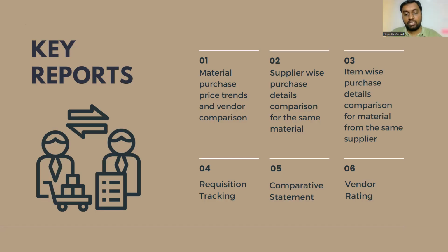Then we look at comparative statement. Comparative statement includes all the necessary documents. Like I told, incorporation certificate, ISO certification, previous projects. If they have done any government project, that also is an advantage. What is the biggest project that they have done? What is their manufacturing capacity? How many trucks or lorries do they have for delivery? Or if they are not taking care of delivery, what is the cost per delivery? What is the price comparison? All those things will be checked.